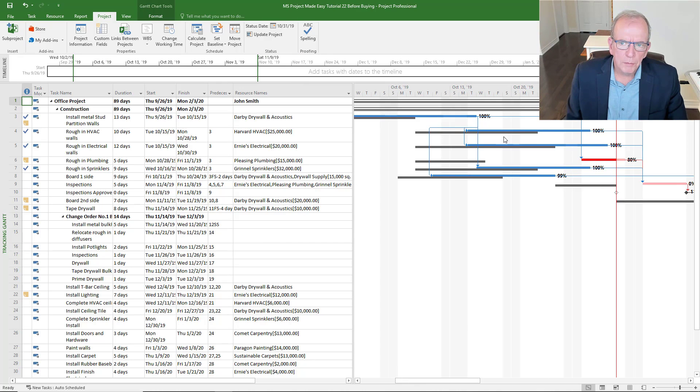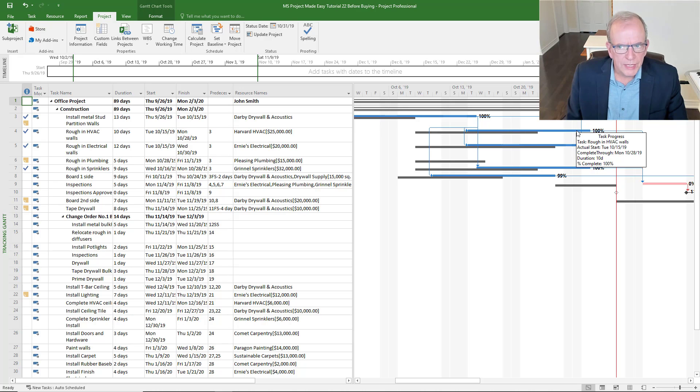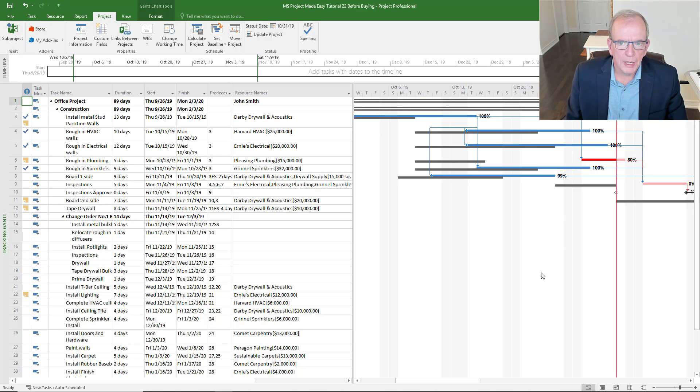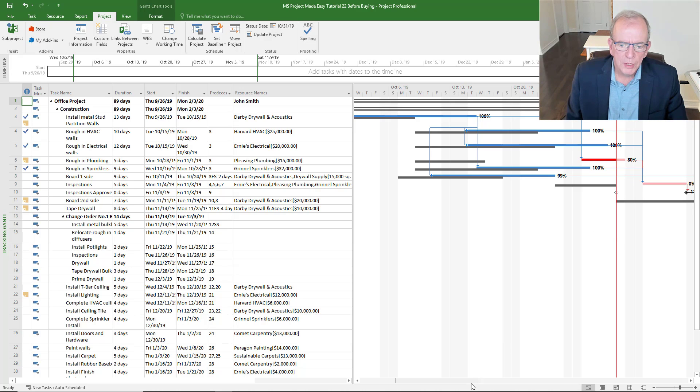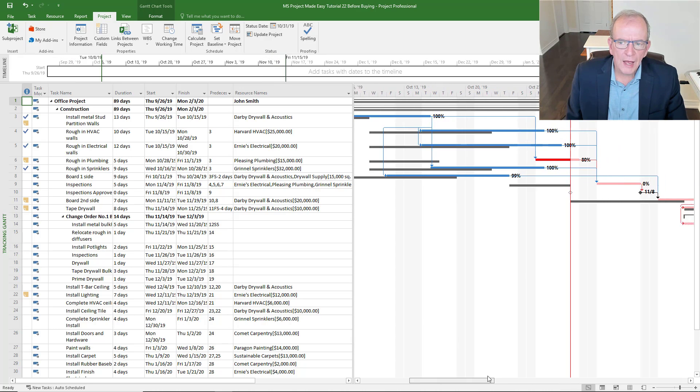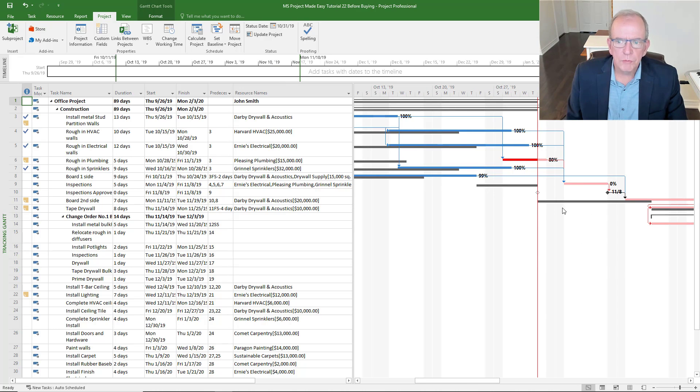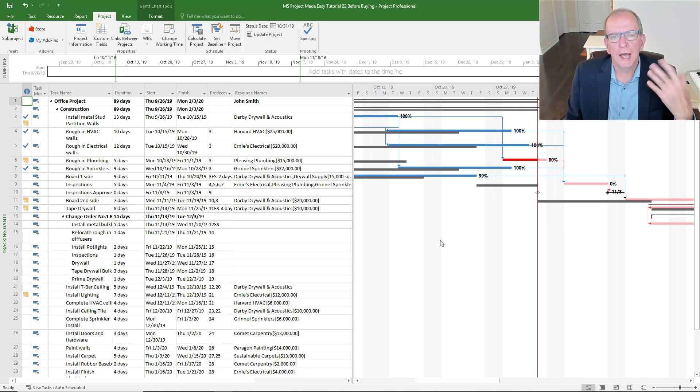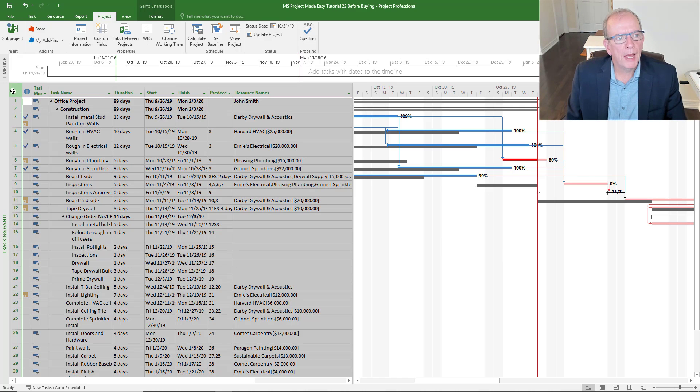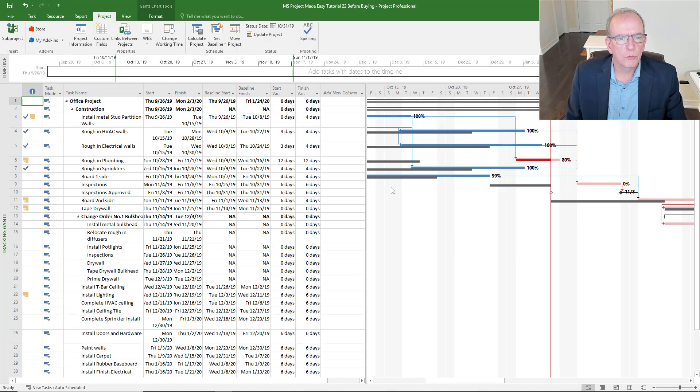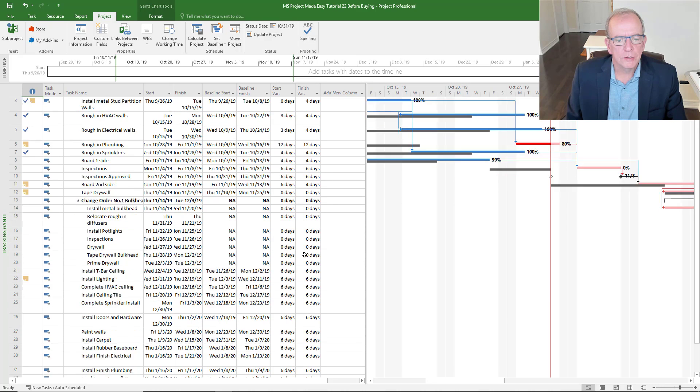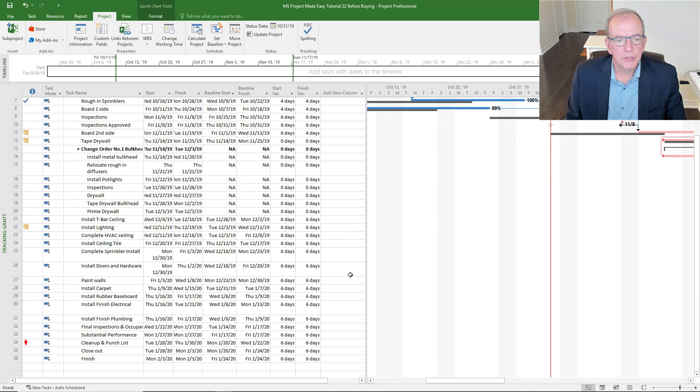There is what we call the tracking Gantt. The bottom bar is the plan, the top bar is either the actuals or the change to the plan. Where you see it over here, this is a status date where you're updating it to. This is after, so this has happened, it's history. This is future. And as we move through the project, we can see how we're doing.